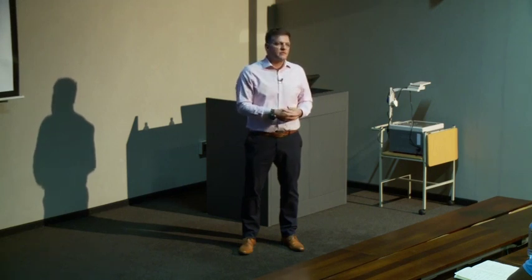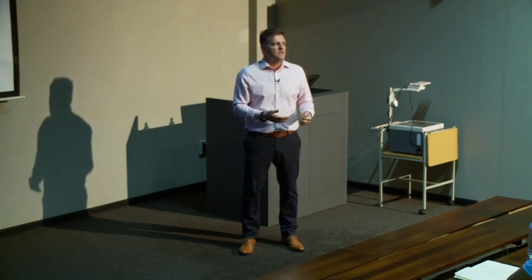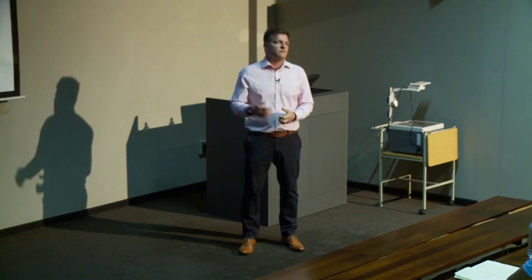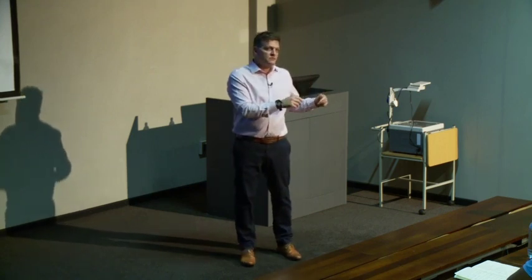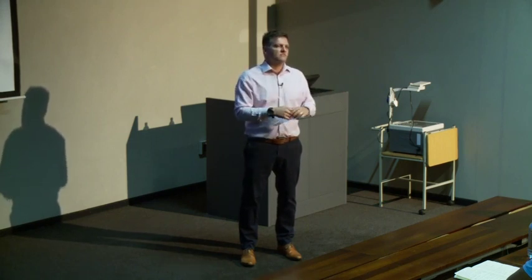Traditional project managers probably don't sit and say, end of the phase, review it, then have a view on what's going to happen. Must you change anything based on what you know? I mean, for those guys in IT development, agile is, they don't use anything like what I've been through now with the predictive life cycles. But with agile, you can use what works from agile. Retrospectives work very well. A review talks about the project, what you've done and what's priority going forward. A retrospective is more like how have we worked together in the project.